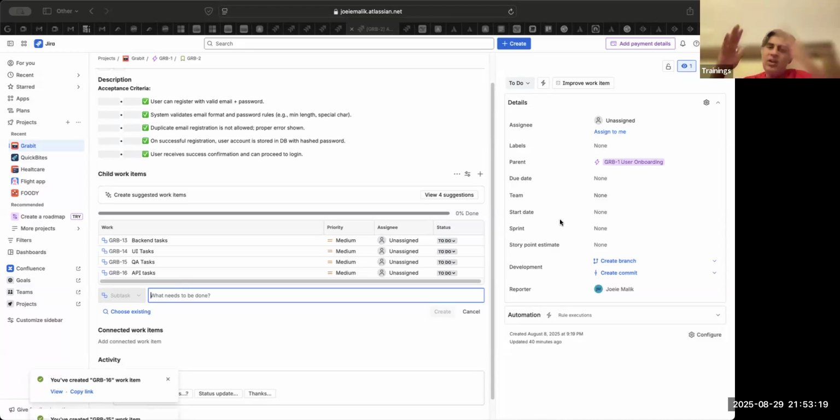After the first round, you ask the outliers. Then again, a second round of estimation. After the second round, if everybody agrees, bingo, we can set the story points. If there is still no agreement, then another round of discussion. Then if still after 3 rounds there is disagreement, you go to your tiebreaker. In the interview, they will ask, okay, you have had 3 rounds of discussion and there is no agreement, what are you going to do? You will suggest that let's include your senior QA, tech lead, or anybody as a tiebreaker. And then whatever he says, we will go with it.